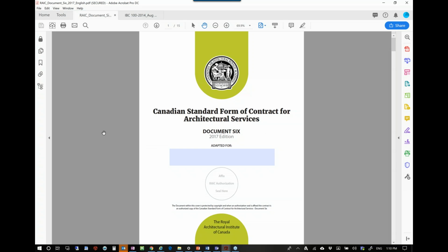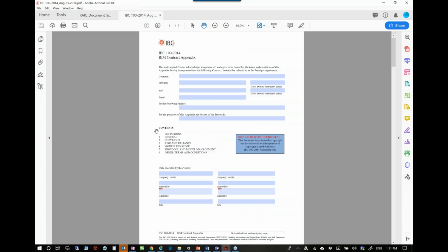America, the United States, has the American Institute of Architects Standard Contract, and I'm speaking architecturally. Engineers have their own contract, and then in Canada, the CCDC, I can't remember what it stands for now, has contracts for contractors, whether it's a lump sum contract, stipulated price, cost plus, design build, etc. They have a whole host of standard contracts. Point is, standard contracts. Today, when I mention RAIC, I mean Royal Architectural Institute of Canada. The UK's RIBA, Royal Institute of British Architects, has standard contracts as well.